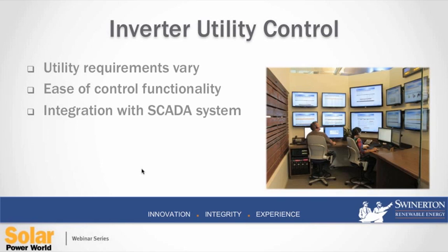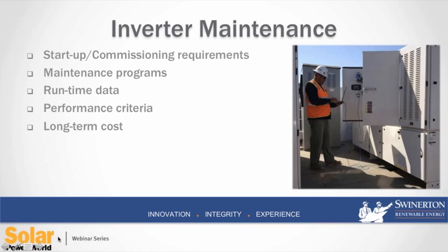Again, as the EPC, it's not just install it, walk away. We're seeing a number of projects come with a requirement of maintaining some sort of criteria during the startup and commissioning phase, whether that be a 1 week, a 30-day, a 1 year type of test, meeting both control requirements, performance requirements, and then also looking long-term.